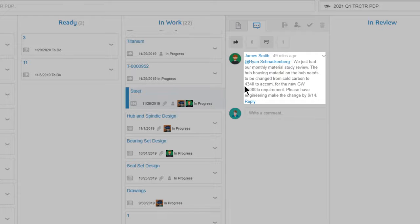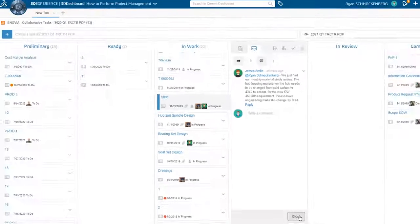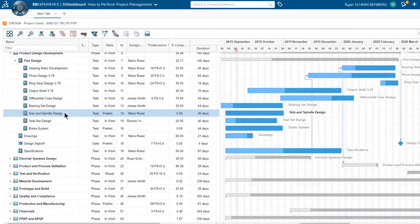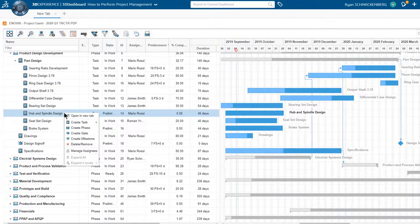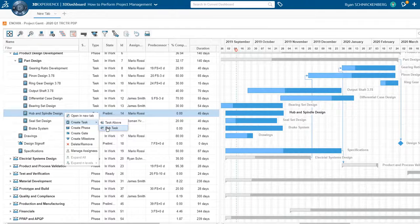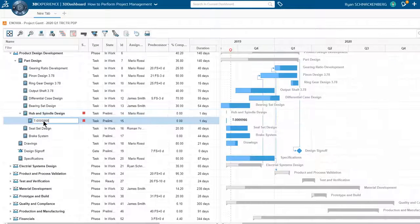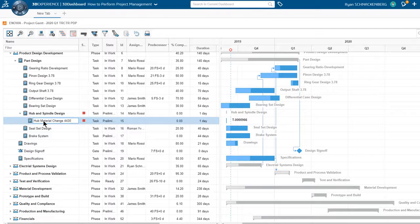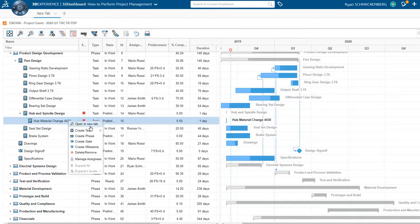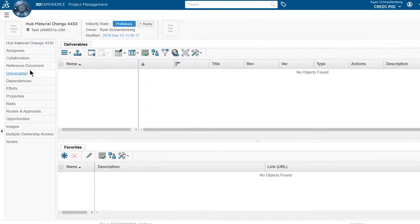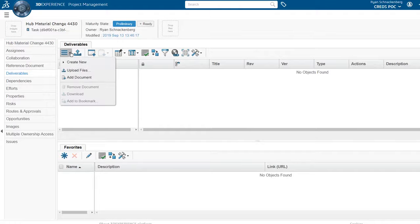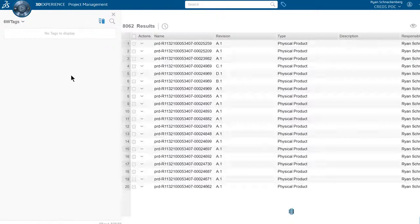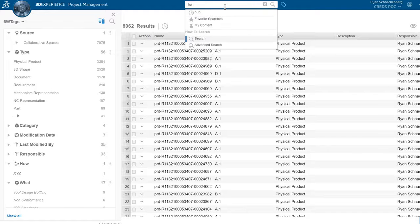Because the new requirements from James are design related, Ryan will create a specific subtask under hub and spindle in the part design phase. He creates a subtask called hub material change 4430. Ryan adds the CAD as a deliverable and assigns Mario.